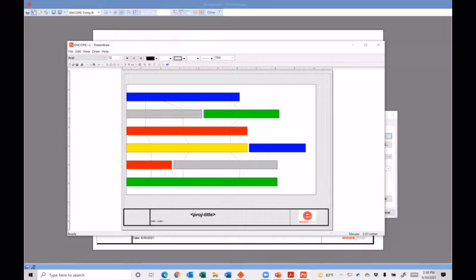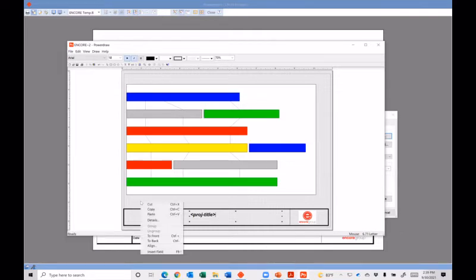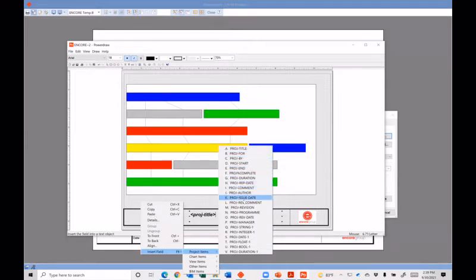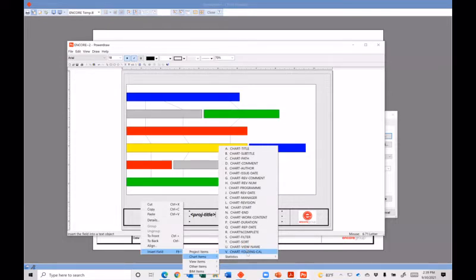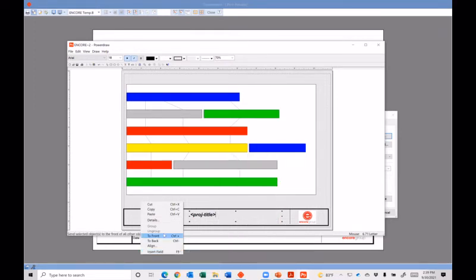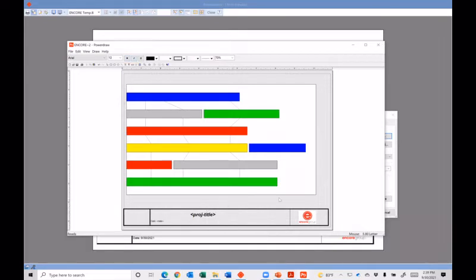This project title is just a field. So if you remember when you set up Asta Powerproject, you give it a project title, like right there on your new screen, when you're creating it, you can put in there all kinds of information. And if I want to insert, all I have to do is just insert in one of these areas and insert a field. And all of these, there's the project title, project start end date, project managers. These are just different fields that are throughout the software package that you can actually insert onto your report. So once you get a good border file set up, you can use it for a lot of different projects. You can customize a lot of different things, but once you close that out, you can insert your fields, you can insert pictures and so forth like that and save that border file.